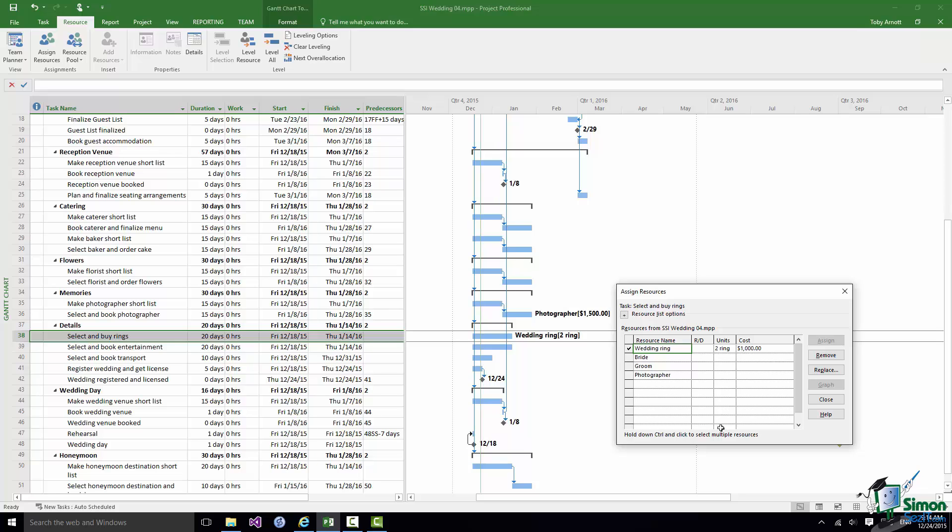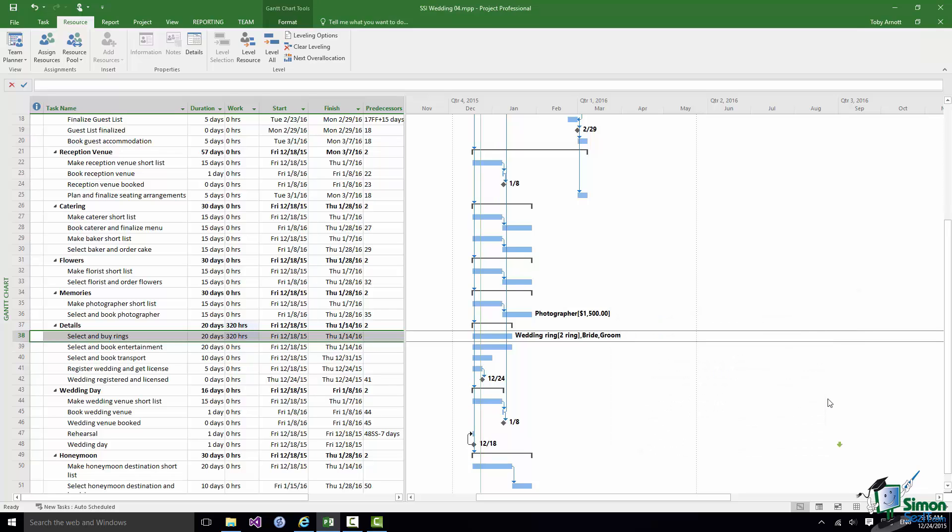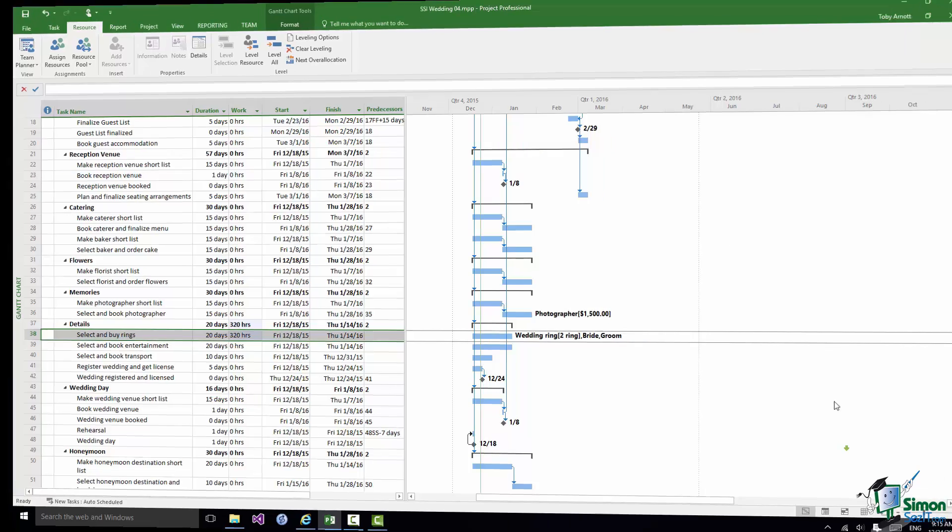Click on Assign and as you can see two rings and it knows that each ring we've allowed $500 for, so that's $1,000 for two wedding rings. The other important thing to bear in mind is that I could at the same time assign the Bride and Groom to this task as well. So if I select Bride, hold the Control key down, select Groom, click on Assign and click on Close, I've got three resources assigned to that task. I've got the Bride and Groom work resources and material resource, two wedding rings and note the units there, two ring.